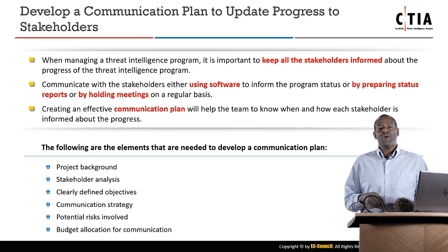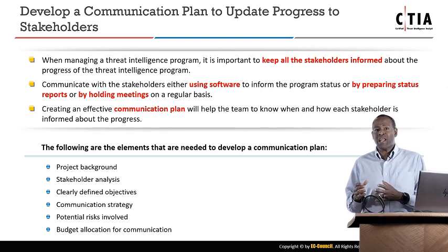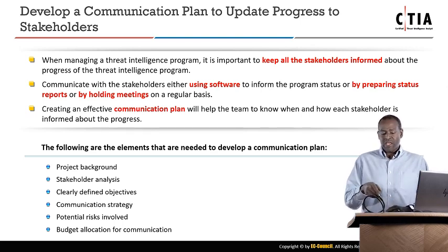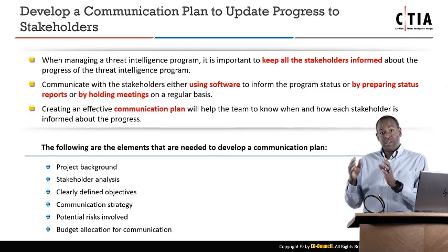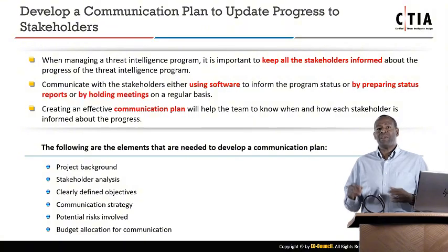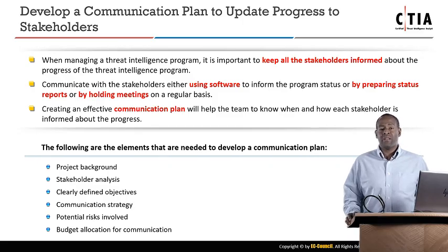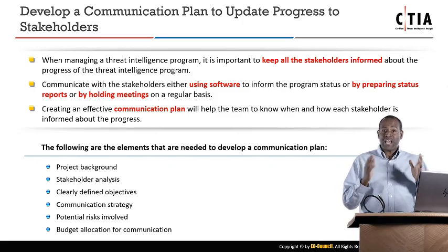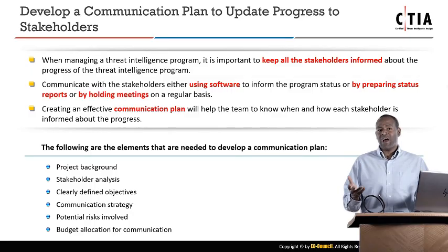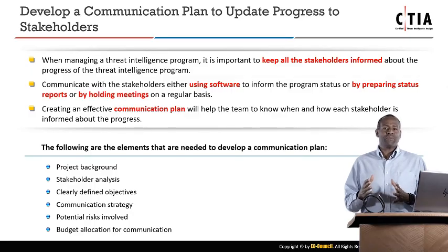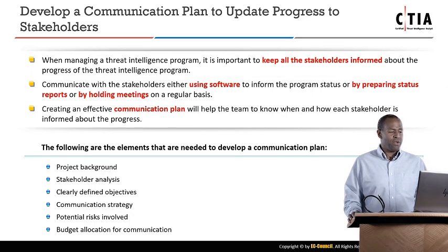more over budget, when if you had just communicated to them, letting them know that yes, we are 30 and 40% over. However, in these areas, in the next quarter and the quarter after that, we are planning to make up for those, and in fact, maybe even come in under budget and ahead of time. If that stakeholder had known that, there would have been no firestorm, and your project plan could have kept going. So very important to have communication.